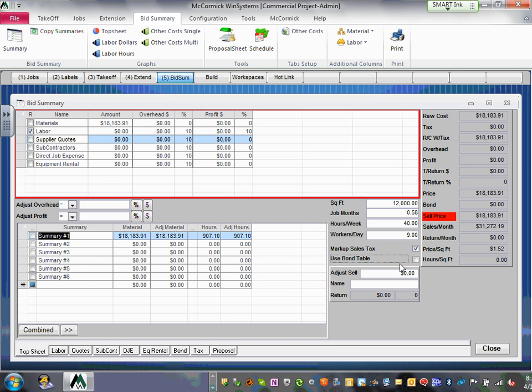Because we have a bond table, guys. We're going to pay money to bond the project. Everybody knows what a bond is. You're going to come and build my building. What happens if you didn't deliver? You screwed me up, right? So I can go after the bond that you bought from the insurance and recoup some of my loss. You know how many companies go belly up, right? So you need to recoup that. So that's where your bond is. Any questions, guys, about this?